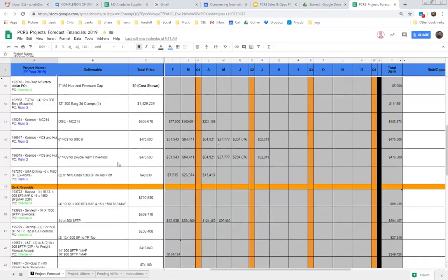As soon as the project gets started, you put it on, and then you take the total revenue of the project and separate it in your best possible manner. Sometimes you might not know when it's going, but based on your baseline schedule, I think the forgings are going to be coming here. You kind of spread it out so you know when things are happening.